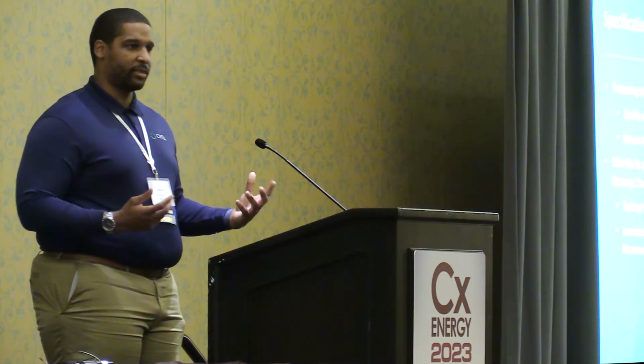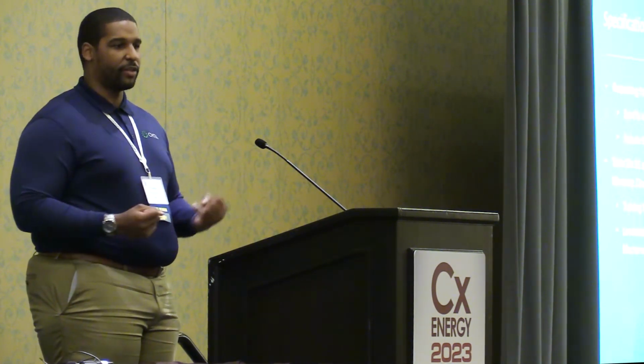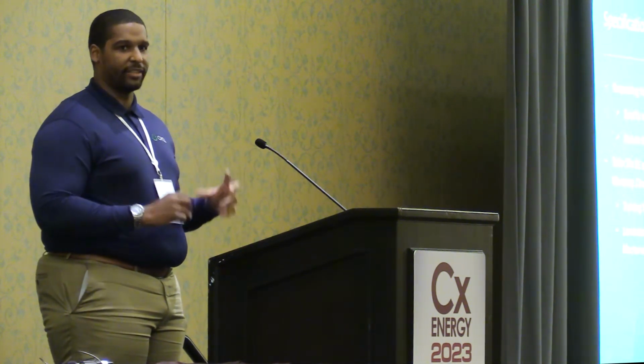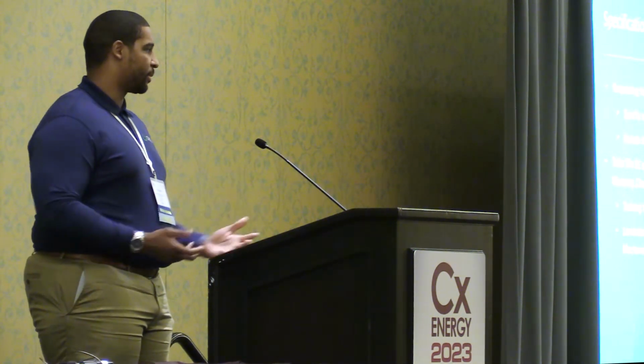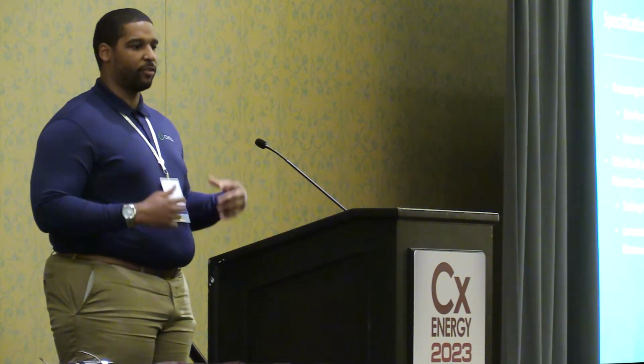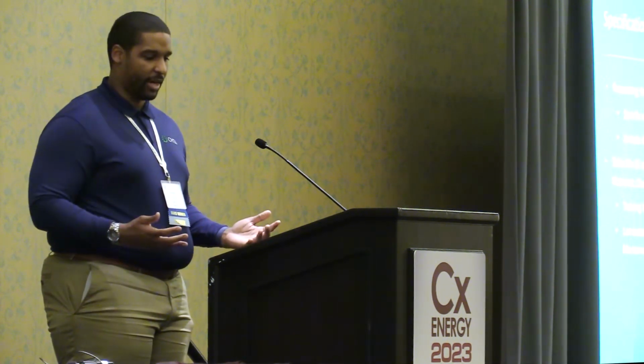What KPI requirements, what is your building going for that you want, and you can have it trended, you can have it in there. As long as you write and describe exactly what you want in the specification, it gives you that opportunity that it becomes part of the contract. Everyone's level sets, everyone can price it accordingly and get it into the project.